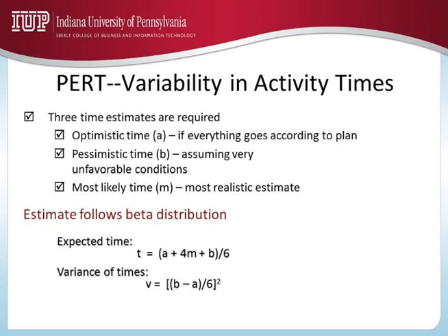So this 90 days should be estimated in such a way that the probability of taking more than 90 days, or the pessimistic time estimate, is also less than 1%. So the possibility of taking less than the optimistic time is 1%. The possibility of taking more than the pessimistic time is also less than 1%. And then in the middle you have most likely.